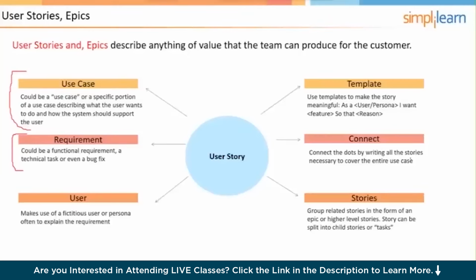So I'm going to go back to the whiteboard, and a product backlog is going to have a lot of user stories that come from the customer, right? Whatever the customer wants done. But the team may know that it has to do some development work in order for the user stories to even be able to work. There's some system level non-functional requirements that need to be done. And so there could be tech user stories. And then, can you see this low? I can't see your chats, but then there could also be defect user stories. There could even be risk user stories.